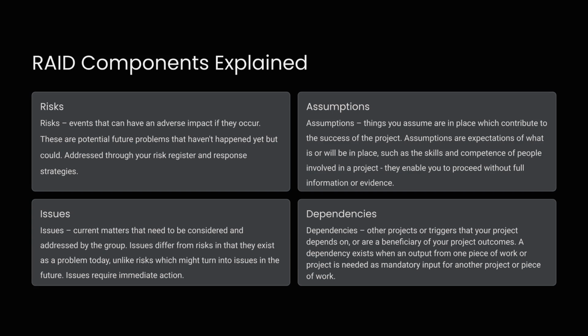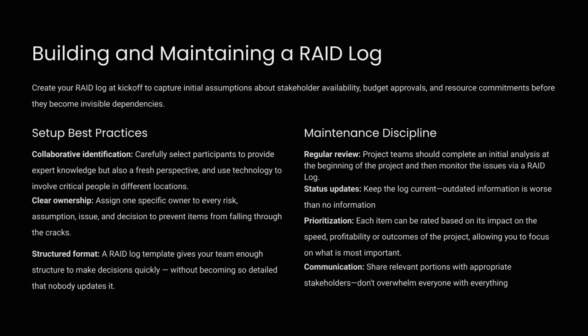Issues are current problems requiring immediate action. Dependencies are external projects or triggers your project relies on. To maintain a RAID log, start at kickoff and use a structured format. Ensure clear ownership for every item. Implement maintenance discipline through regular reviews, status updates, and prioritization.